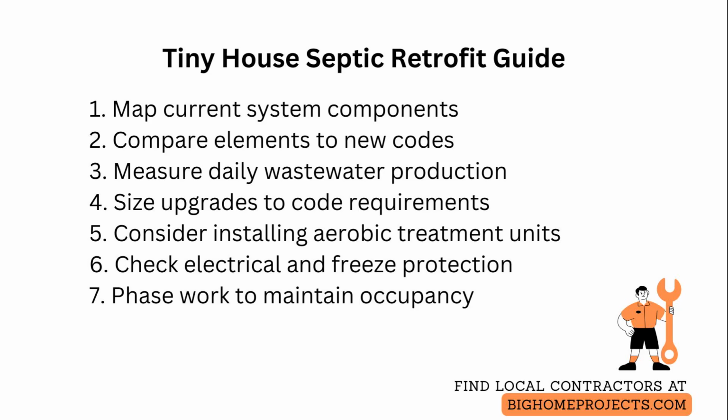Plan for a permit pathway by preparing as-built drawings, an engineered retrofit plan if required, and a clear narrative showing how the retrofit brings the system into compliance.